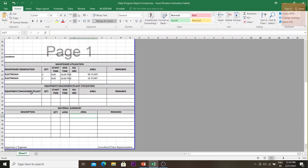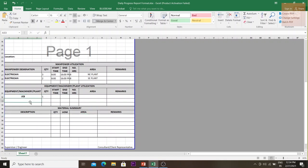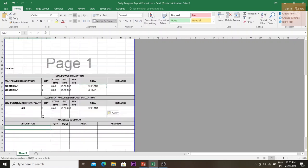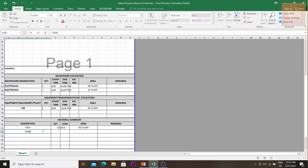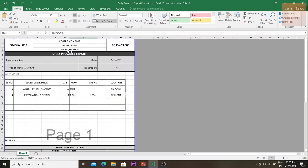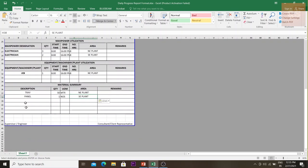For the equipment, machinery, and plant details section, you would mention items like a JCB, a generator, or a vehicle — just one number, with timings, such as 8 hours in the northeast plant. For materials, since cable tray was installed, you'd record 50 meters of cable tray and one panel as the materials used on that day.